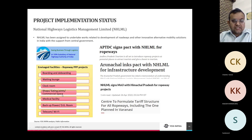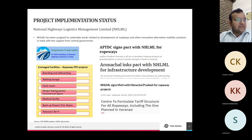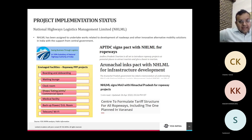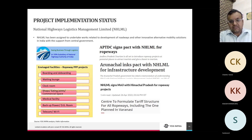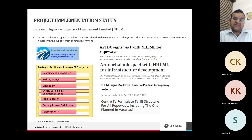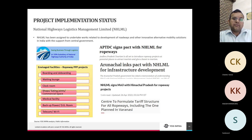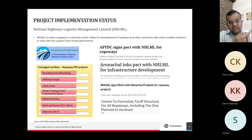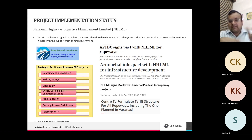Some of the envisaged facilities for ropeway PPP projects include boarding/deboarding areas, waiting lounges, cloakrooms, commercial space — a key element seen across RFPs — medical facilities, backup power, and Wi-Fi. Initially, when ropeway PPP procurement started in India, many states tried implementing these systems under BOT or EPCC models but were not very successful. Now many states — including Arunachal Pradesh, Andhra Pradesh, Himachal Pradesh, Uttar Pradesh, and Odisha — have signed MOUs with NHLML for procurement, and all these procurements are now being done under the Hybrid Annuity Model (HAM), similar to the road sector.